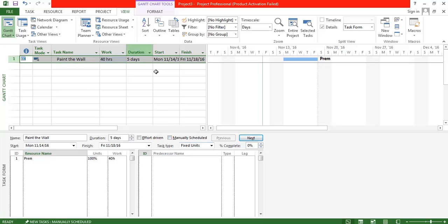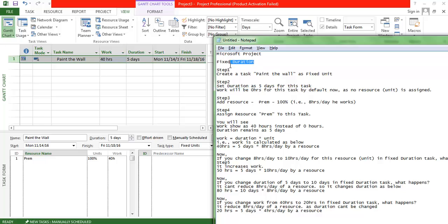Now we understand how Microsoft Project assigns a task. The formula for work is: Work = Duration × Unit of Work. With one resource working eight hours per day for five days, that is 8 × 5 = 40 hours of work. That's exactly what the application calculated.